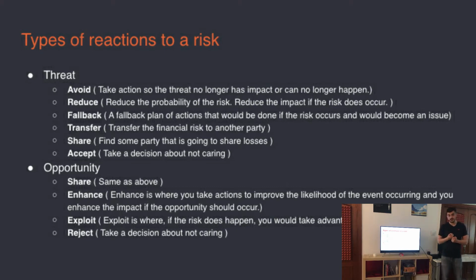You know that there is going to be a foul. You know someone will lose money. But for example, you will say, taking care of this will cost us more than actually having this loss at all. So why bother? And this is what a lot of companies do.